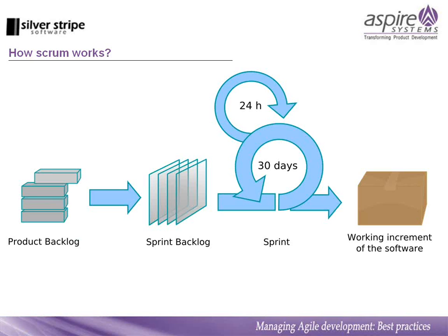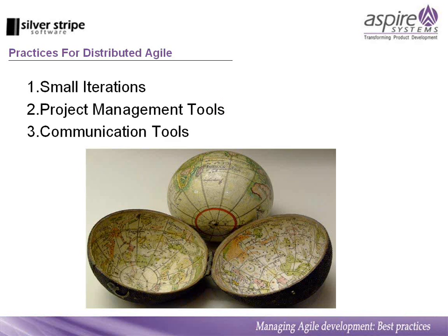And at the end of the sprint, you have a working increment of software. Now the key point here is working increment. All the features done during the sprint, you have to do the requirements, you have to do the coding, the testing, the integration completely, and it has to be working software. So you don't want a case where the team takes a bunch of features and does only the analysis for them. That's not what we want. At the end of every iteration, you want to build one subset of the system from end to end. So that's a quick high-level overview of Scrum.